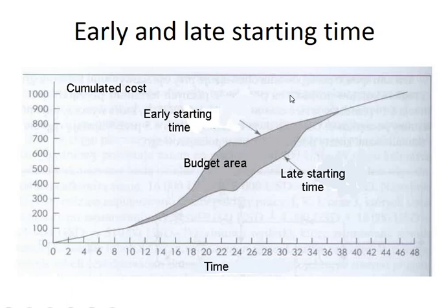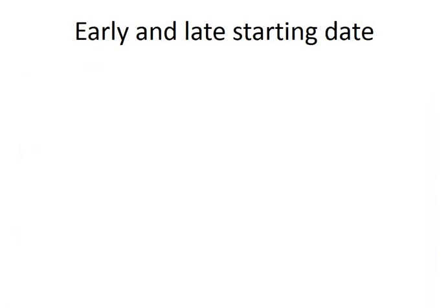Usually, if you are the executioner, you wouldn't like to start the particular tasks too early, because then you would have to have even more money at your disposal. So these are those little things that can make the difference, because nobody wants to invest too much too early.